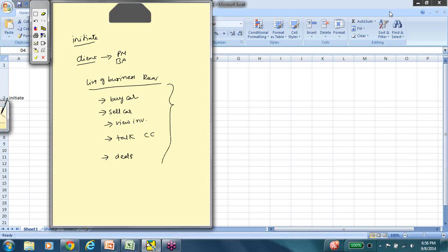In the initiate phase, while the gathering happens, the inbuilt activity that goes on is the feasibility analysis. Feasibility analysis at this point answers only one question: the requirement that the client is putting forward, can it be built? Yes or no? Now, do you think there are any requirements that cannot be built, team?